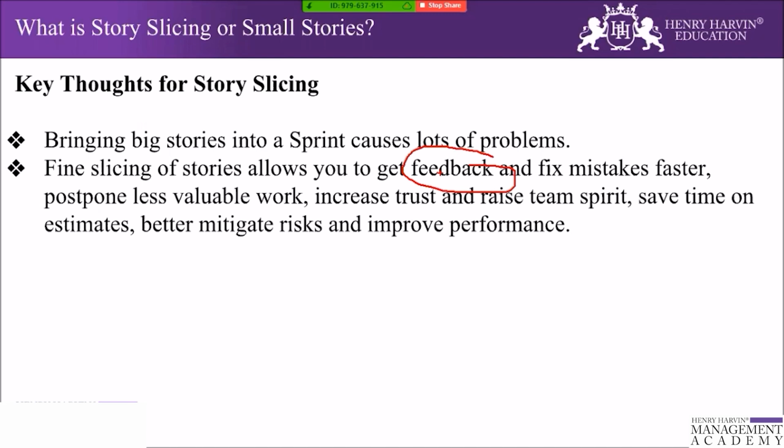Part of the problem is the frequent misunderstanding around the value in this story. In the INVEST principle which we have read earlier, the V stands for value, and many people assume that it equates to business value or a feature that you can sell for $1. When we combine user stories together, they represent features that customers will pay for, right? But on their own, they are too small for that. You cannot convert every story into a dollar value. Instead, value refers to the point of view of the user for whom the story was written in the first place.